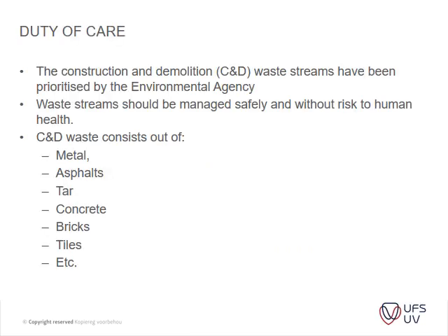Okay, duty of care: the construction and demolition waste streams have been prioritized by the environmental agency. So basically once you've demolished something, you need to get it off site. You need to plan for it. That's the short and long of it. You can't just demolish something and not have a plan of how to clean your site. Waste streams should be managed safely and without risk to human health. And the waste may consist of metals, asphalt, tar, concrete, brick, tiles, etc.